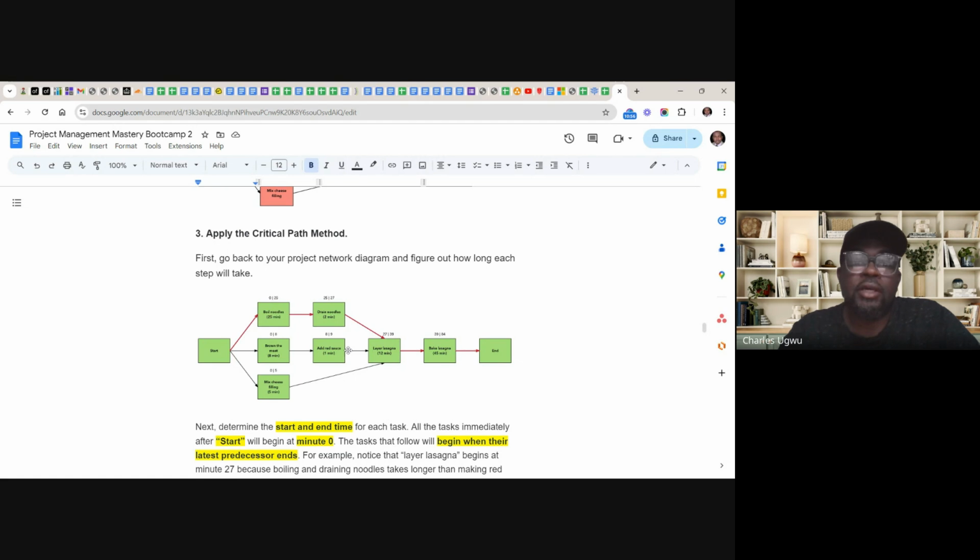As they are going, you cannot, but as these ones here are moving, between them here, this one starts, but there can be delay within this area, like a few days delay or a few minutes, but it can be delayed for some period of time while this one is going on. That's why we are not seeing it as critical parts. Although there is a sequence here, there is a bit of delay. It can be delayed and it's not going to affect the overall project, because this delay can be contained within this area.